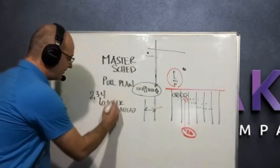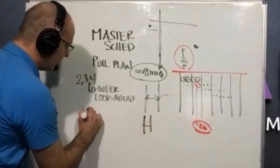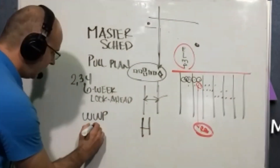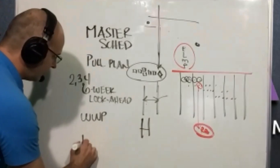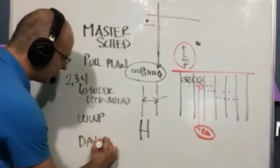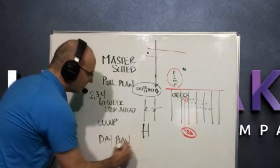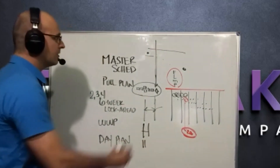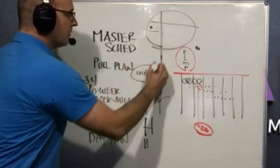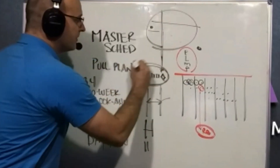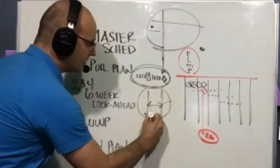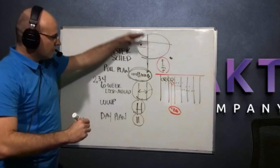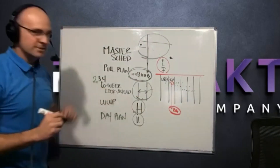From there, you'll filter out a weekly work plan — WWP — and then create your day plan as part of the TACT and Last Planner system. So you're going from the overall macro, to confirming that with your trade partners, down to your look-ahead, to your weekly work plan, to your day plan.